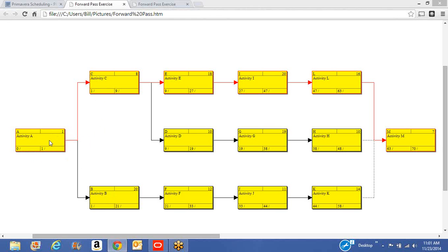But consider that you could have an activity that starts at 8 o'clock in the evening and finishes at 4 a.m. So that's an 8-hour task. In that particular situation, you could have an activity that finishes at 4 a.m. on Tuesday, and its successor would start at 8 p.m. the very same day, not the next day. I know a lot of us are used to the idea of thinking that something always starts the next day, but that's not always true.